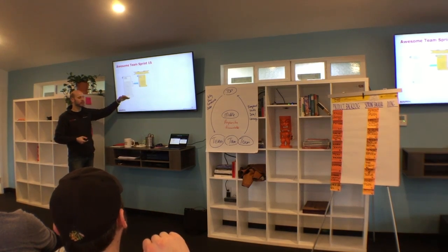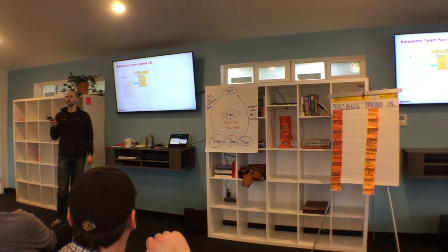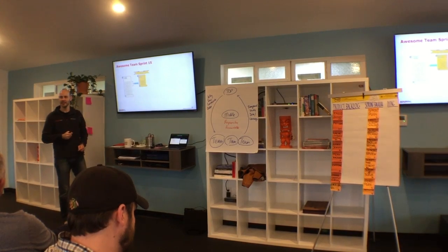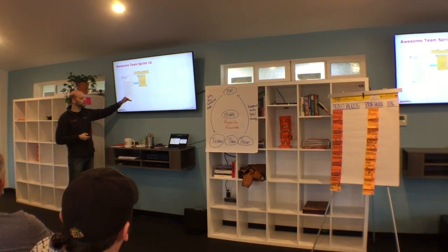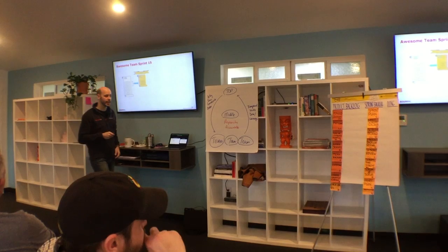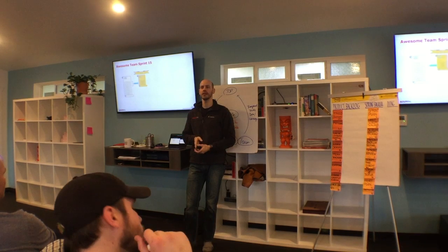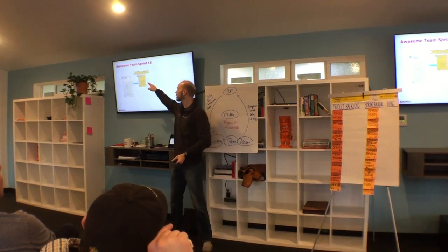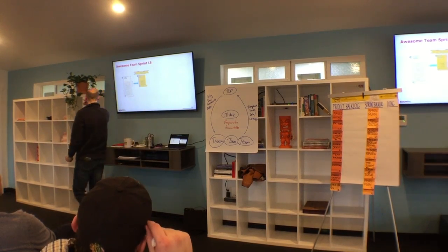All of the product backlog is already estimated by the team during which Scrum ceremony? Product backlog refinement. One brave soul felt brave enough this morning to say to the room, yes, during product backlog refinement, the entire product backlog has been estimated. Using the technique that Diane and William walked us through yesterday, it takes maybe an hour the first time, even for a long product backlog. And every refinement afterwards, maybe 5 or 10, maybe 15 minutes to check the estimates, because they've all been estimated before, and we're just checking if they've moved, if we've learned more about them, or estimating just the new stuff.